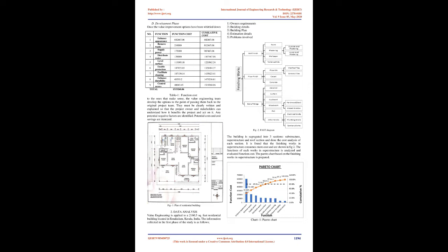B. Speculation, creative, phase. This phase represents the generation of improvement ideas. The team develops alternative ways that the project can perform the functions that have been identified. At this step, the functions are looked at individually and each one gets a list of alternative ways to perform the function. There is no judging between the importance of the various functions.